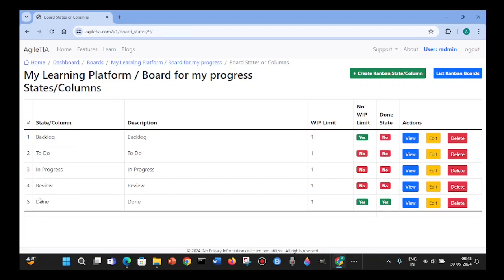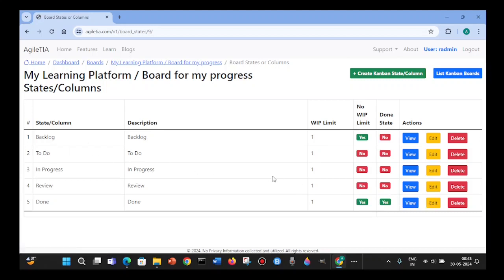The default columns are Backlog, To Do, In Progress, Review, and Done, and these have WIP limits. Looking at the additional parameters, there is no WIP limit for the Backlog column and no WIP limit for the Done column, but you can set these by editing each column. You can also change column names, add more columns, or delete columns as needed.